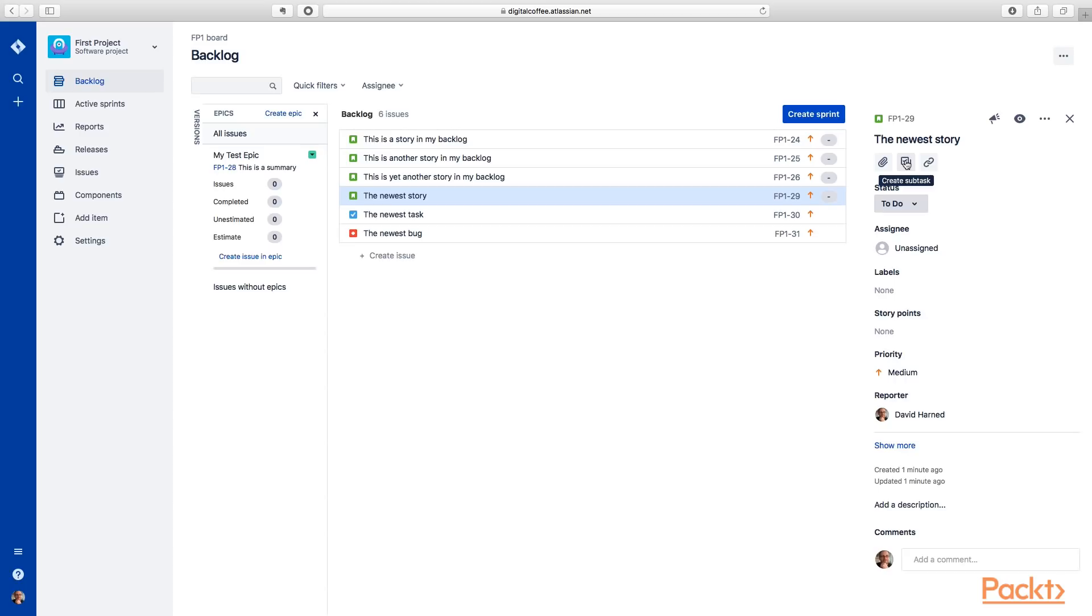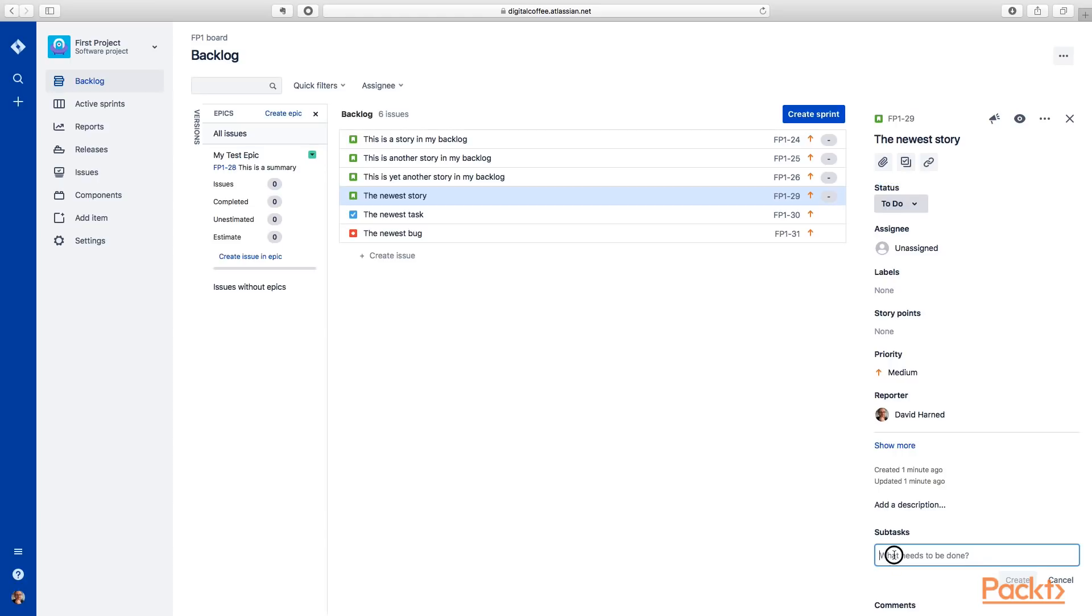But then also we've got this create a subtask option. Again, we might use a subtask if this story is going to need to be worked on by multiple people. And we really want to have more granularity around what each person is going to do. So we click this create subtask.